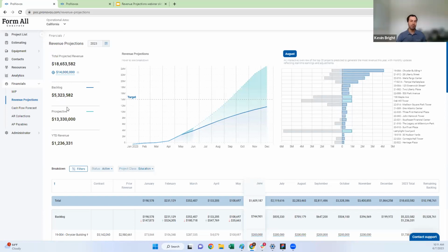If I have a $5 million job and I'm 20% into it, I have 1 million in revenue to date, and then my remaining backlog is 4 million. It's jobs that you have a physical contract for, a legal obligation to perform. What's that contract amount, and what's remaining on that contract that you'll get paid for at some point. So it doesn't matter if you started the job, as long as you have been awarded it and have an obligation to perform the work. Yep, exactly. Okay, cool.